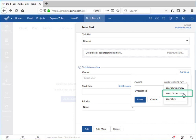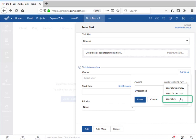Finally, I can specify the actual number of work hours that I think the task will take and Zoho will calculate the number of days I've allocated to the task and figure out how many hours per day the assigned resource or resources will be working on the task.